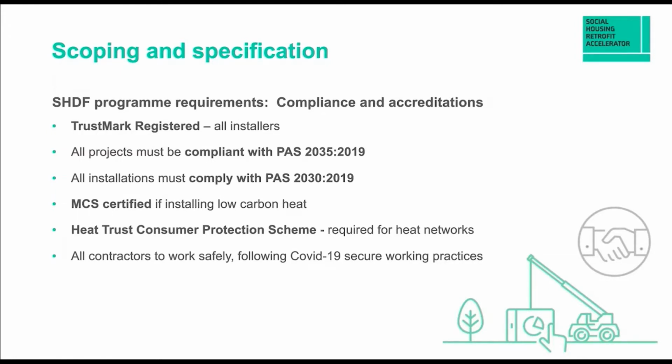So Trustmark registration is required for PAS 2035 key people, so retrofit coordinators, assessors, evaluators, designers, etc. Those are all key roles within the PAS 2035, and also for installers who need to be PAS 2030 accredited for the different measures that are being installed. They all need to be Trustmark registered.